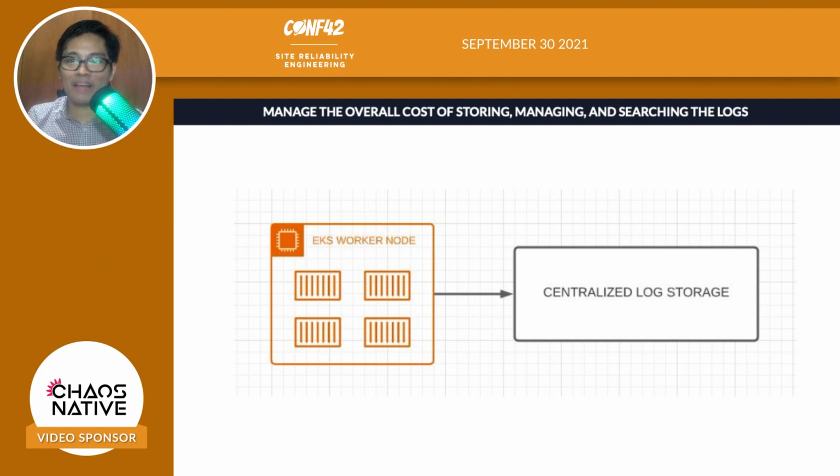But after a couple of months, when you check the bill, you'll see, hey, where did this additional cost come from? Oh, the logs start to build up because we're trying to collect a lot of logs. Because yeah, the more logs we have, the better, because it allows us to debug the site better, right? So you just have to worry about the additional cost of storing logs, and also making sure that there's also backup, because you cannot just remove the logs and reduce the number of logs being collected by the system just to reduce the cost. So knowing the different options on where to store the logs, that's also the second step.